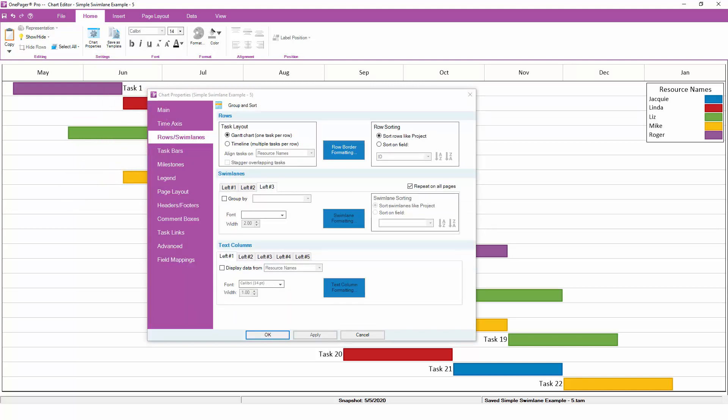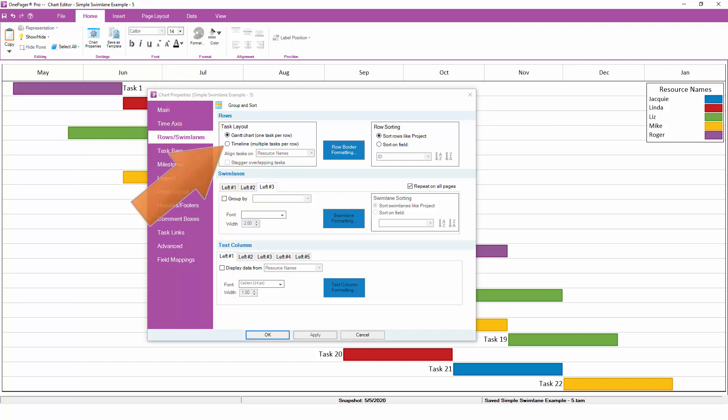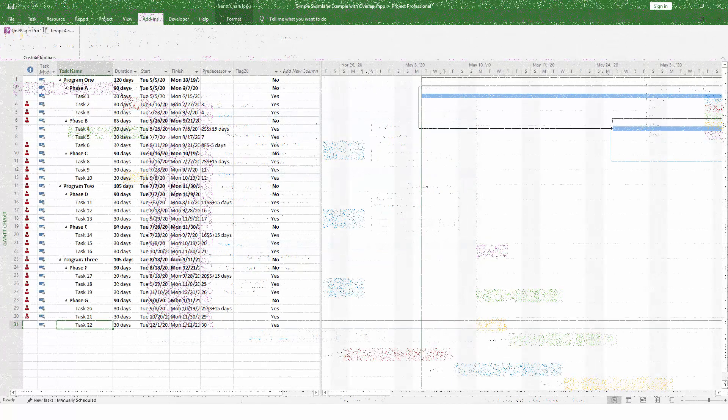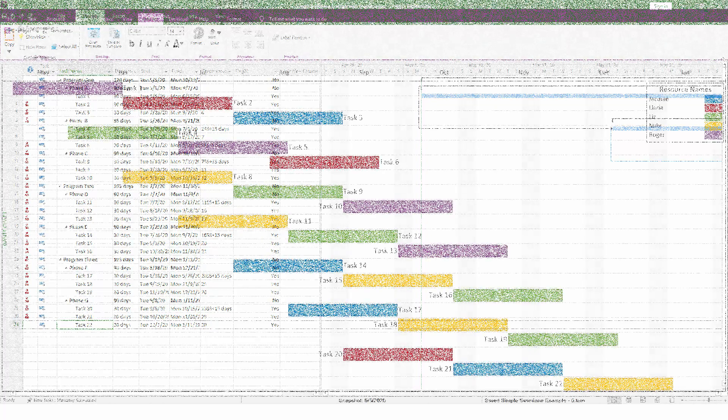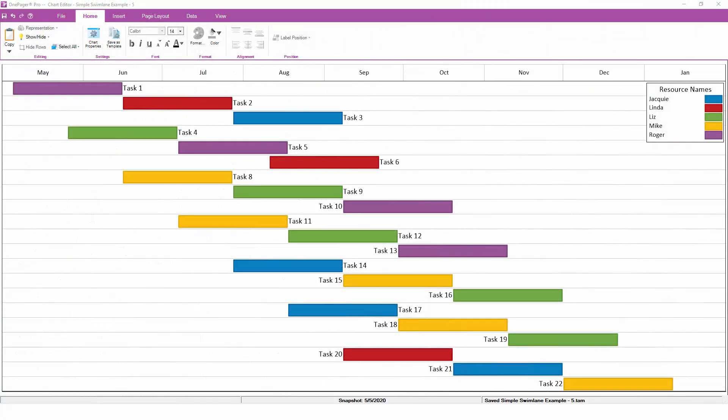The first section at the top covers the layout of the chart. OnePager gives you the option of either a Gantt chart layout with one task per row, or a timeline layout with multiple tasks lined up left to right in the same row. Let's take a look at this example project plan. If we import these tasks from the project plan into OnePager and choose a Gantt chart layout, we'll get a chart that looks like this.